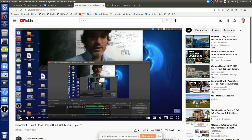The wood cuts were really difficult to discern what we needed, and we wasted a significant amount of time just arguing over, no, it's this one with the three. So if it's on the board, which is a direct reflection of what was in your CAD drawings or on your listings that you provide us, it will make it really easy. When anybody's done cutting, they just cross it off, or the taskmaster crosses it off, and that would really enable us to be a well-oiled machine.